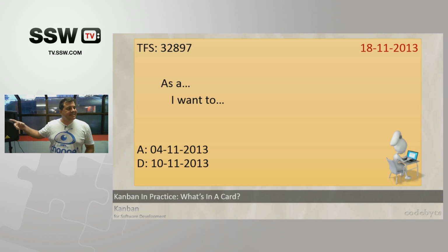When you're tracking, it's not just time tracking. You need to track when it was pulled into different columns, who pulled it, and who worked on it and all that. But then you can pretty much come up with, hey, each one took this much time, right? And which helps with our cycle times, by the way. Each one took this much time for us to complete. And you can actually see how your graph looks, how the whole progress looks.